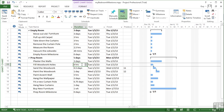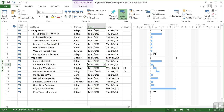It may be that I'm not really sure how long it's going to take to fill the woodwork holes because we don't know how many there are. So instead of having six hours in there, I'm going to click into the duration and just add a question mark to the end. That makes it an estimated six hours. When I tab through, you see I get the question mark in there, and the question mark is also encompassed in the summary — five days question mark is now an estimated duration for the prep room.